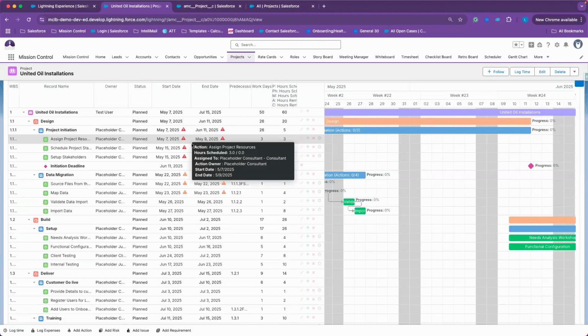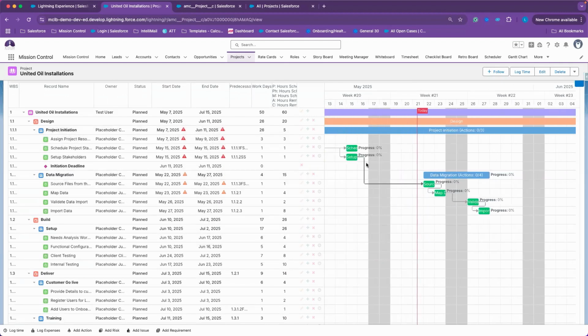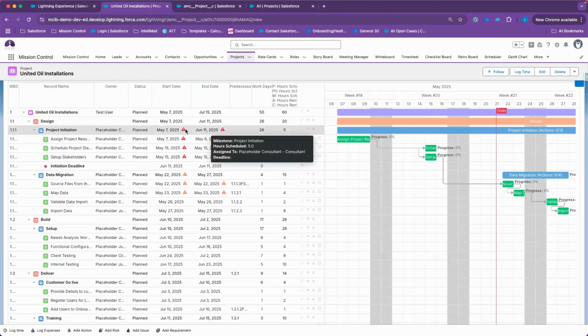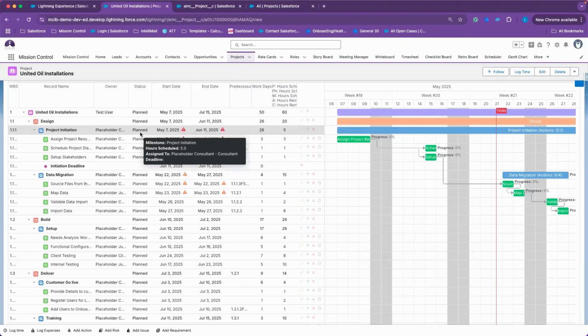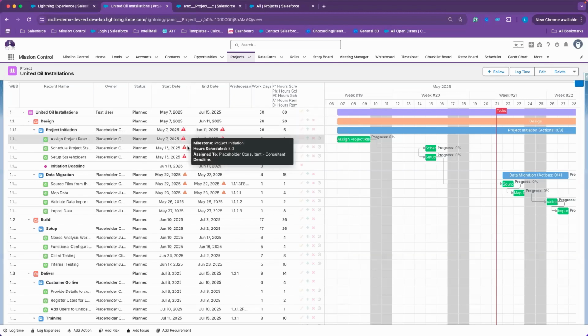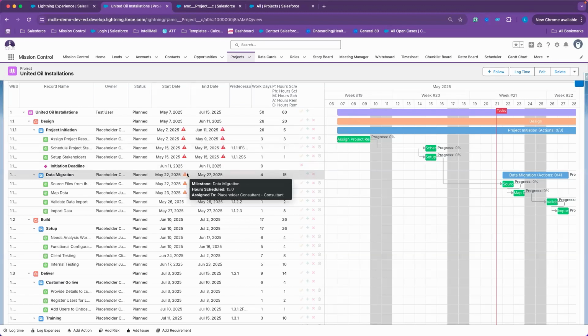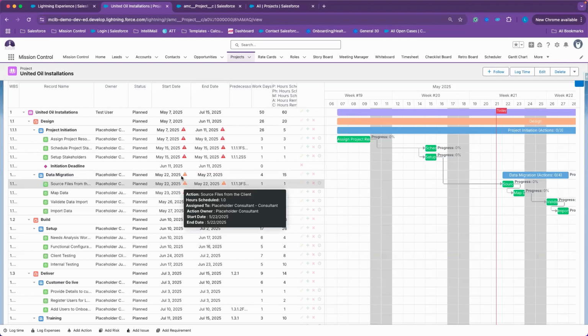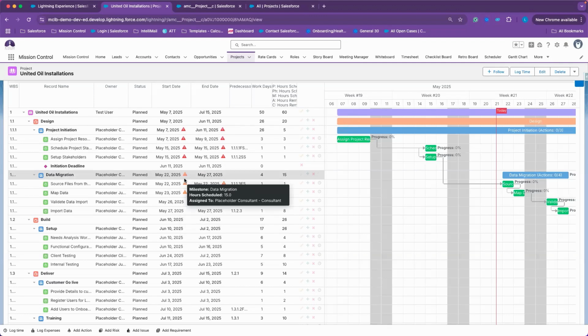And as you can see, I now have some red and amber color flags here to just alert my users to know, hey, the 7th has passed. This task is not in completed status. If I've begun the task because my end date goes into June, then I've at least progressed the task. Okay. We also have the amber symbol because the 22nd and the 23rd are coming soon, and these tasks will be up next to begin.